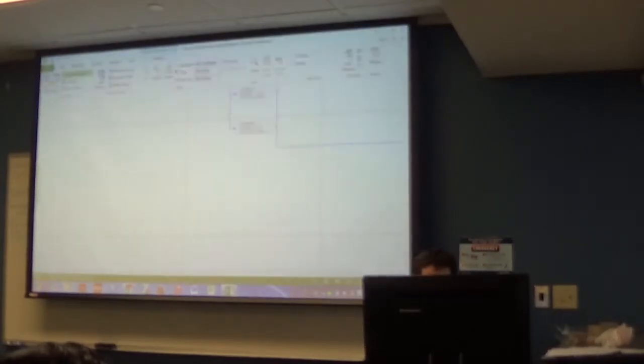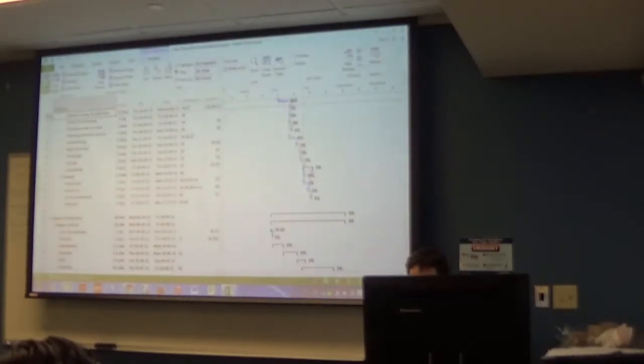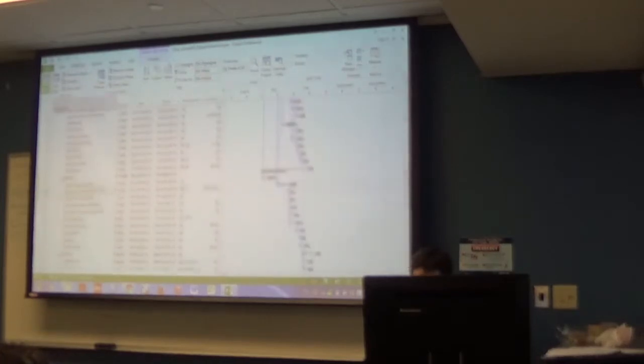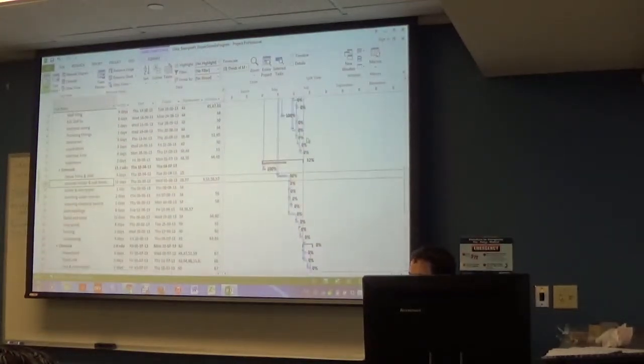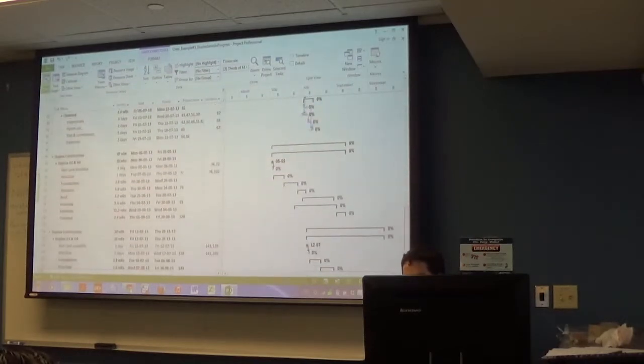This is where the critical path remains, here at the bottom. We'll look at costs in a second, but we've been talking about the critical path a lot, so I figured I'd show it like this. Right now, since he has aligned this duplex with the ones below, the critical path has moved from that first duplex construction to the next one.